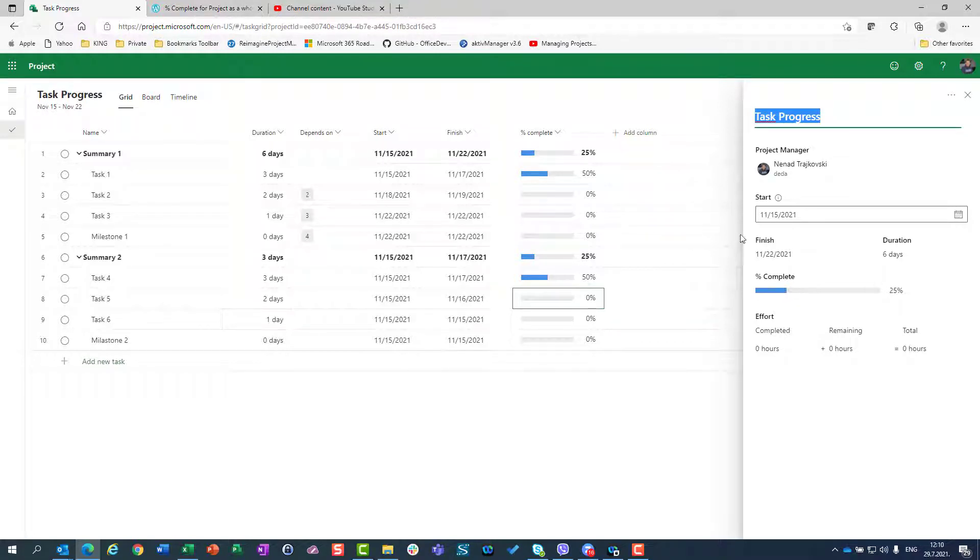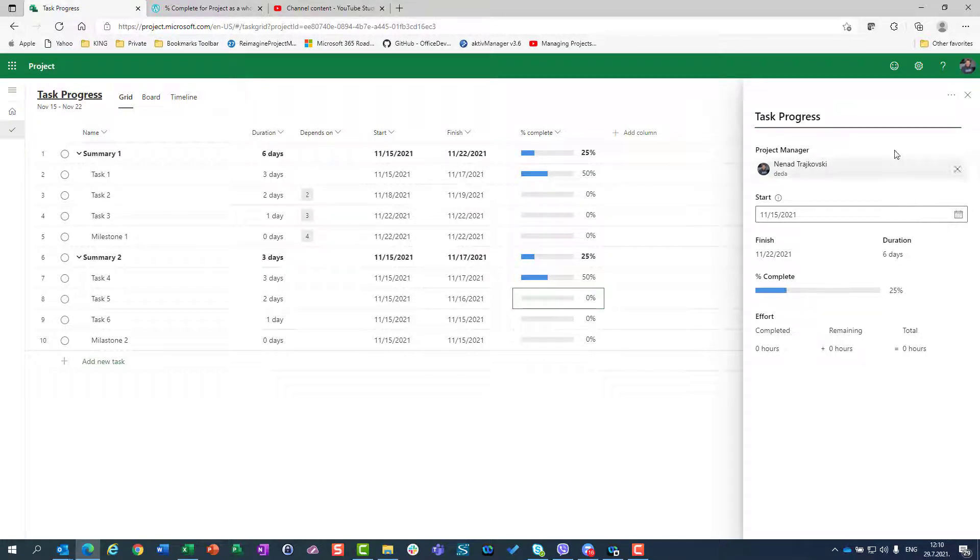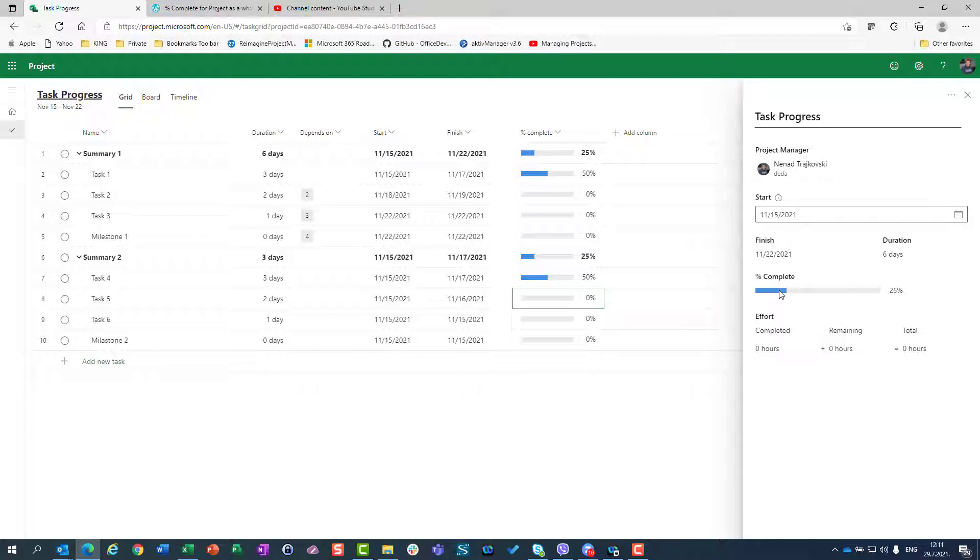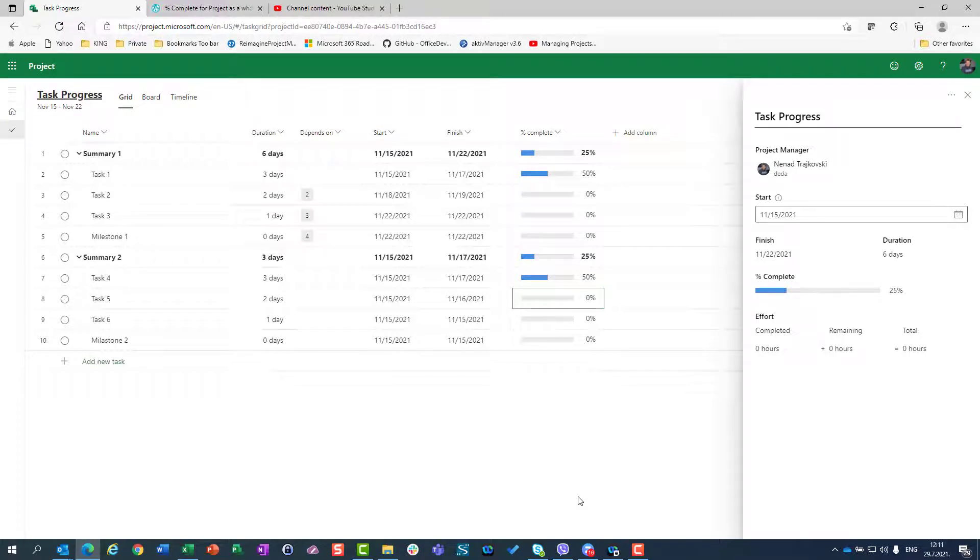You may ask yourself or me, but what about progress of all projects? We know that task one is 50% done and task four is 50% done and summary one is 25% done and summary two is 25% done. But what is percentage of completeness of all projects? You can get it here to go in task progress and you will see 25% here.